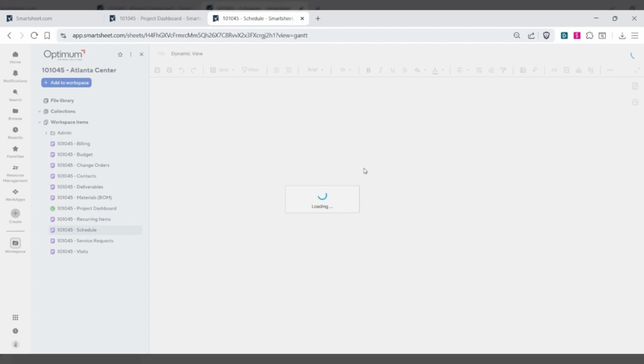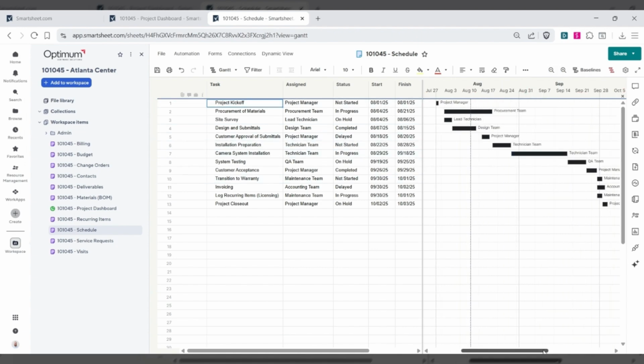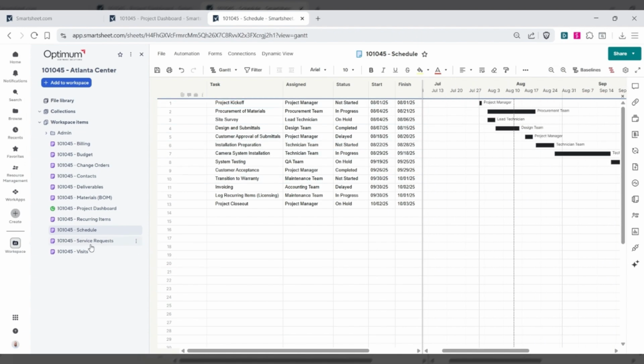And down to some of the tail end content in here are things like your engagement schedule. So if you're not necessarily in the warranty phase of an engagement yet, and you're actually kicking off a new engagement with a site specific, you can maintain things like a customized kickoff schedule where maybe you're installing equipment prior to turning them over to the maintenance realm. So whatever your processes may be for startup, maybe before moving to that maintenance or commissioning, you can certainly leverage a schedule like this to plan out those activities over time and see what might be the forecasted beginning and end dates for that work.